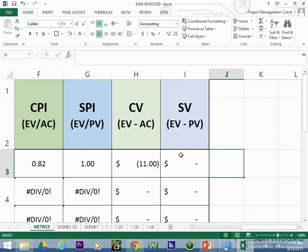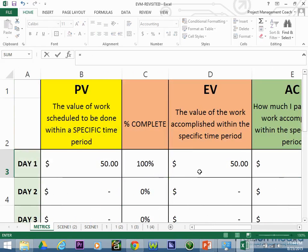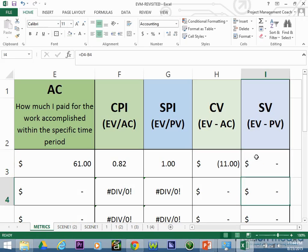The schedule variance is earned value minus plan value, which equals zero — meaning we're doing great as far as schedule is concerned. We accomplished all the work planned for day one on time, even though we went over budget.